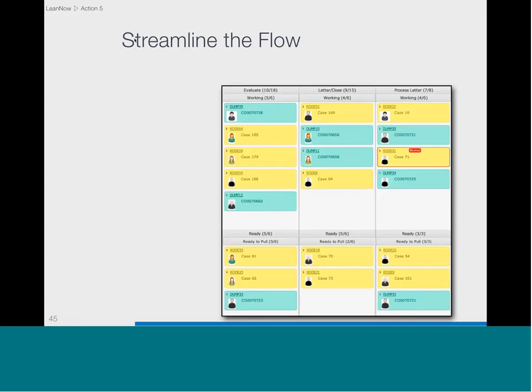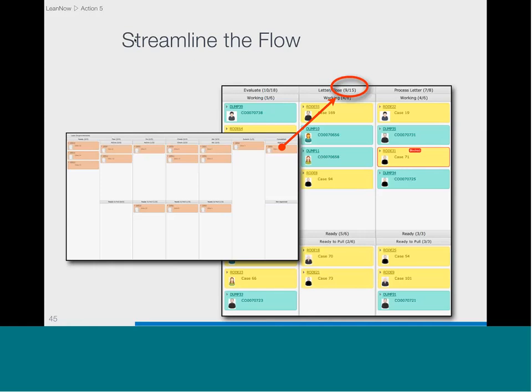So the improvement off of the continuous improvement Kanban board influences the flow board, because those improvements allow us to reduce the limits on the columns. When we reduce the limits, that more tightly couples the processes and decreases the amount of time it takes work to flow across the board. So the performance of our flow improves as those continuous improvements come back around to influence the limits on the board. And so it's a virtuous cycle, but we can use the Kanban board in two different contexts, and it's really handy to do that.